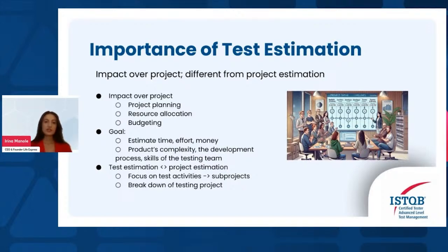Test estimation is different from project estimation because it specifically focuses on testing activities, which are often sub-projects within larger projects. It's important to break down the testing project into specific activities like test planning, test execution, and reporting before the estimation begins.